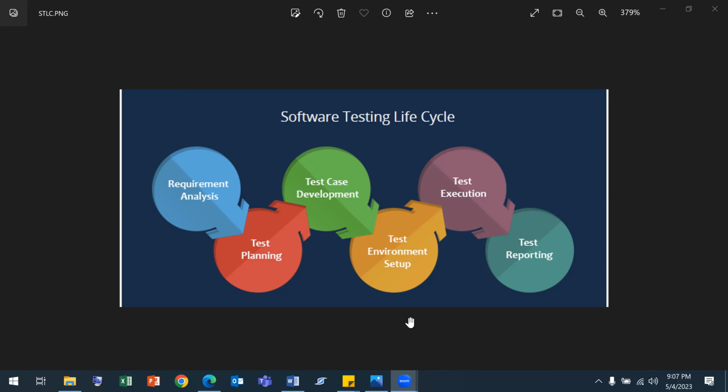Where's the catch? Say login is not working, but you tested add a friend and post a photo and they are working, right? So they have a dependent functionality, which is login in the first phase, because without login, you cannot get into Facebook, right? Yeah, that's right. Even if the second 2 functionalities are working fine, you cannot push those 2 functionalities to the production, because you have the dependency on the first functionality. So it depends on the phase of the project, and on what functionalities you are working with. So it all depends on it.